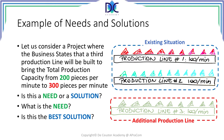Nevertheless, we have to be sure that it's possible to increase the capacity of the production lines. If this is possible, it is a feasible alternative. It also depends on the age of the existing production lines. When we increase capacity, the failure rate and the quality may be impacted. The work also has to be done during production time, depending on the setup of the company. So when you are working on the production line, you have a reduced capacity, which also has to be calculated in the total solution. On the other hand, upgrading a production line is likely to be cheaper than building an additional one, so there are some positive and negative points to consider and we have to make a calculation about this solution.